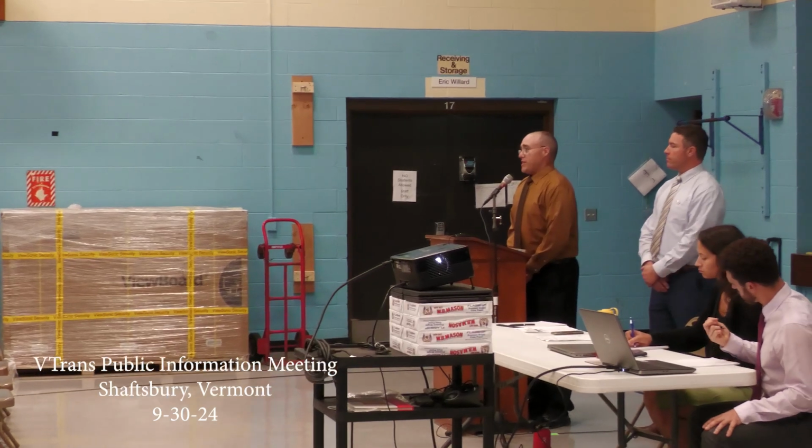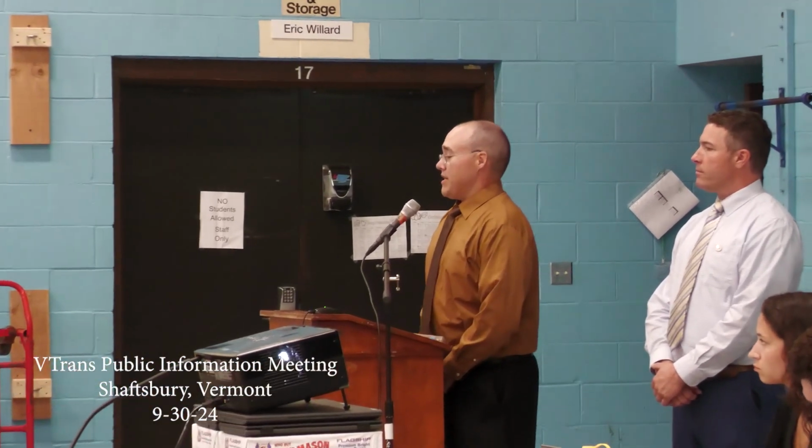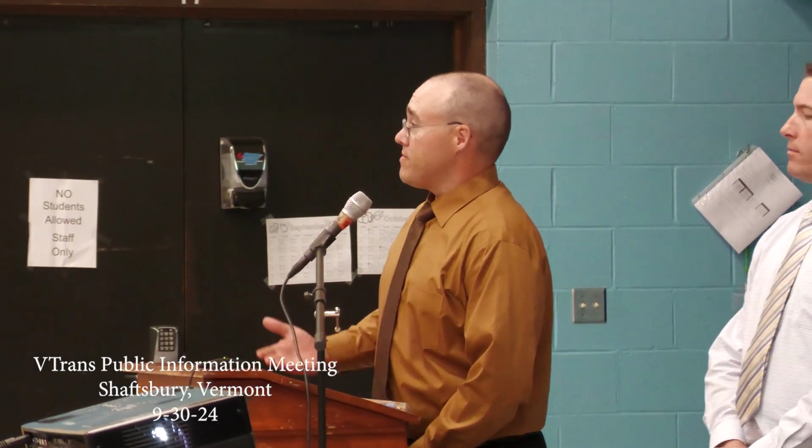We will be carrying a number of uniform traffic officer hours within our engineer's estimate, specifically helping people get through the work zone and navigating. And also, being that this project is on the National Highway System, we do include a budget for traffic enforcement as well, in the case of speeding.